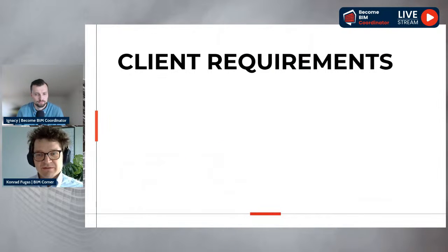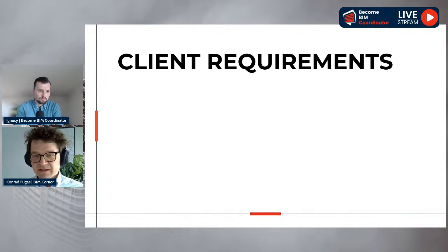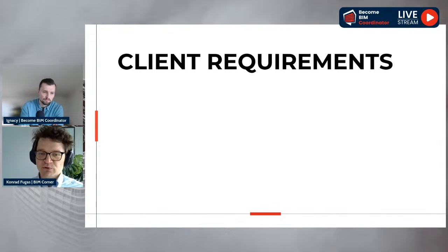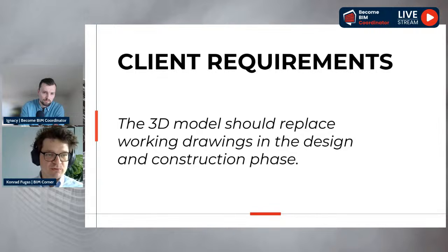Before the start of the project, our client defined the core challenges that make hospital development too slow and too expensive. And one of the threats was too low level of digitalization. And the client made the requirement crystal clear in every contract signed for the new university hospital in Stavanger. It's written that the 3D model should replace working drawings in the design and construction phase.